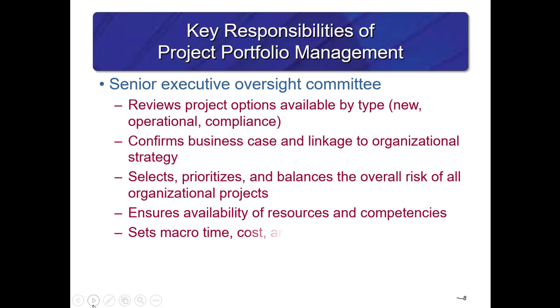The Senior Executive Oversight Committee is a group or team that reviews project options available by type, new, operational, compliance, etc., confirms the business case and linkage to organizational strategy, selects, prioritizes, and balances the overall risk, ensures availability of resources and competencies, sets time, costs and requirements, and reviews the gating or phase outcomes.